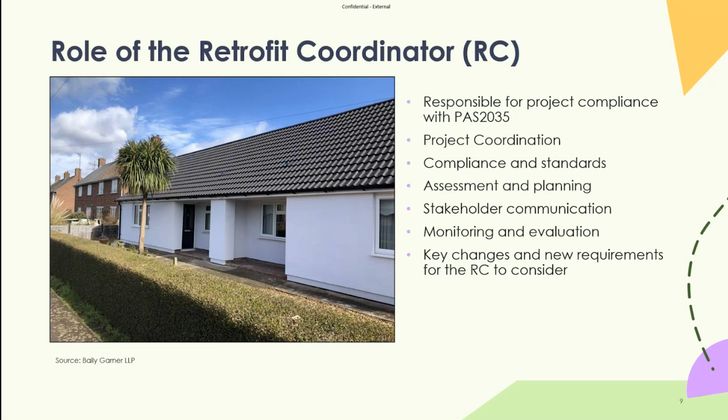So they need to actually understand what the roles are of those individuals who play pivotal roles in the project itself. They obviously ensure that the project is compliant to PAS 2035, and again, oversee those other roles I referenced earlier. But there's also other compliance requirements outside of PAS that they need to consider, such as building regulations, planning, and they need to stay abreast of changes in relation to that. An example of that is the somewhat recent introduction of the Building Safety Act, which again will affect any construction or retrofit project.